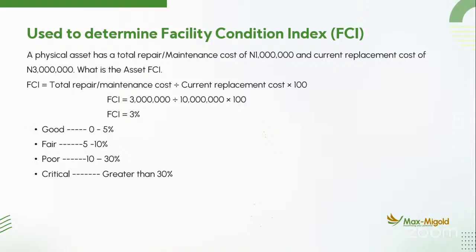When you are doing a 2-bedroom flat, you discover that the roof has been impacted, the building wall has been impacted, the foundation has suffered what we call structural differential, and the old painting work has gone. The facility has been abandoned for maybe, let's say, 6, 7 years. When you bring experts into that place, they say the entire roof is gone. You have to change the entire roof to a new one.